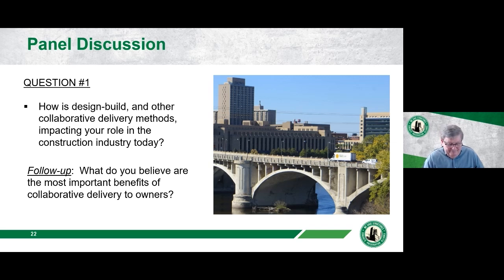I love the discussion on risk, and this comes into a key concept that's hammered. So for those interested in a deeper dive in terms of design build, DBIA offers a 3-day certification class, and one of the overarching messages is that risk is assigned and allocated to the party that's best able to manage that risk. So that's a key foundational item, and that plays out through looking at from the beginning of the project and the initial project scoping that the owner does before they've ever put out a solicitation. Owners of choice will first allocate the risk as they see fit before they ever put it on the street.